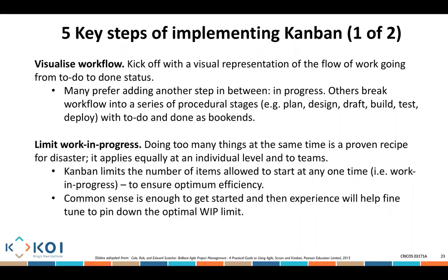Second thing to bear in mind is when you're putting work in progress, you are limiting how many items go in the work in progress. Why? Because the more items allowed to go in the work in progress, these items might end up creating blockages. So maybe people would say, let me just finish 99% or 90% of a user story, but let me not worry about the last 10%.